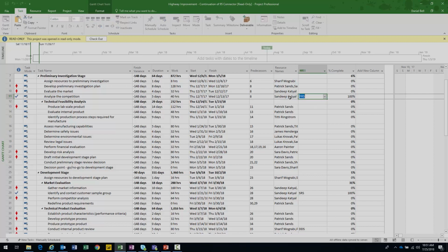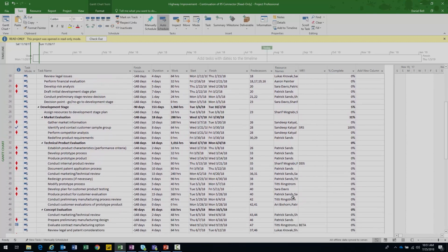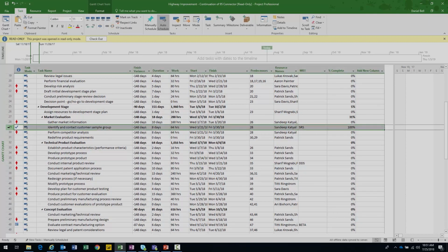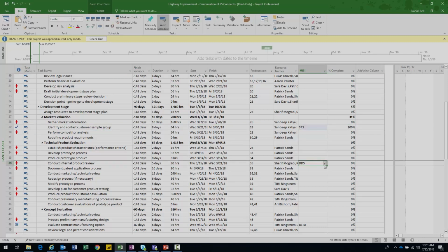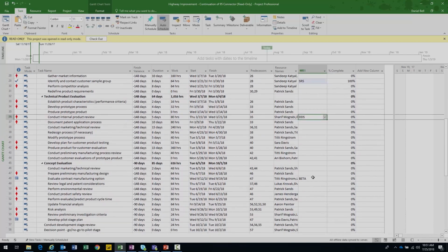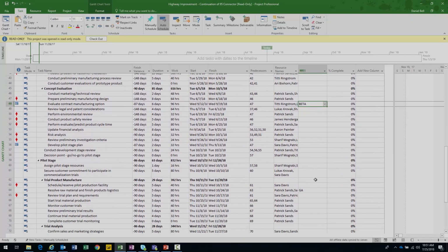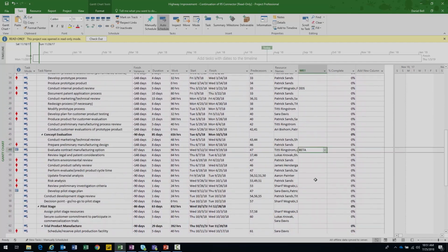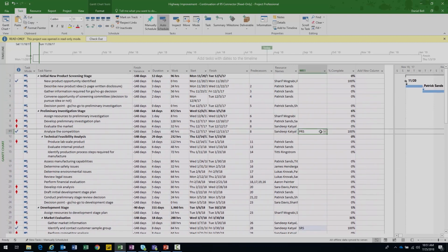This represents my PRS milestone. Down farther, you see this one at row 29. I assigned that my SRS milestone. There's my DDS milestone there, and so on and so forth throughout the project. You really need to avoid assigning the same value to more than one task here, because the tool is only going to calculate the value for one of them. So you just assign one milestone per task within this project.